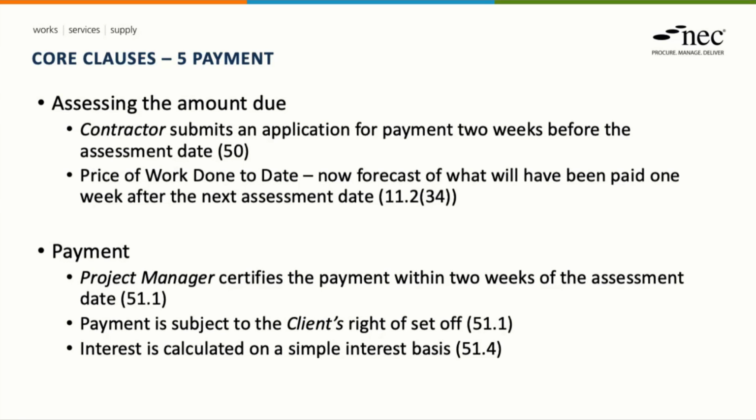So this should help the contractor in terms of cash flow. In terms of the timing of certifying the payment, NEC4 ECC was 1 week, and it's now been changed to within 2 weeks of the assessment date. Payment is subject to the client's right of set-off, and interest is calculated on a simple interest basis.